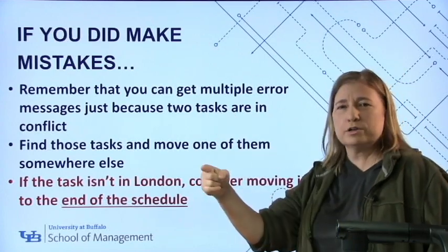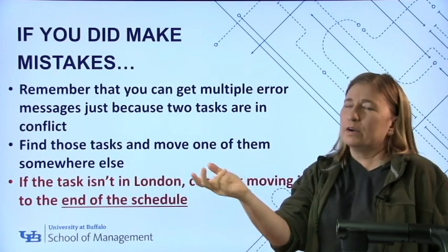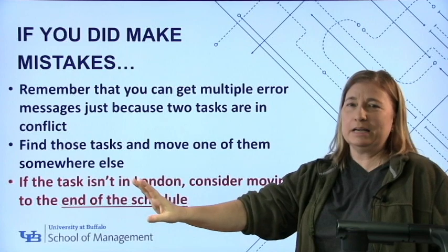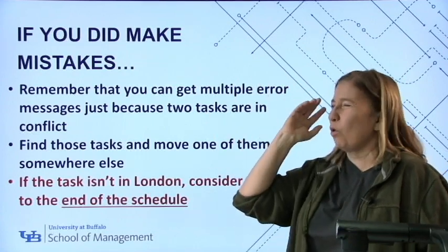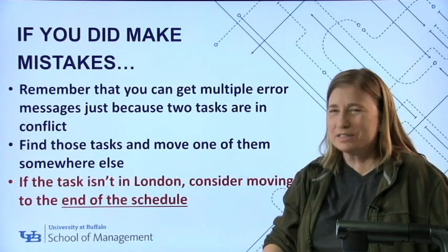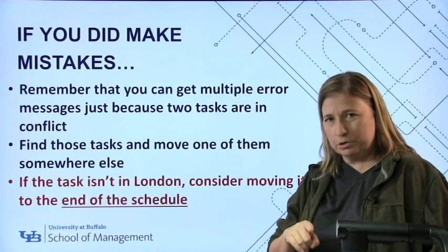Look at your entire Gantt chart. Look at where work ends. My favorite is leave 5 blank days. Doesn't matter what the last work was or who was working on that task. I don't care. Just give everybody 5 days vacation to make sure there's no trouble with travel.